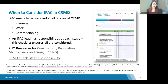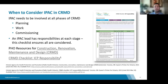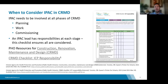Now I'll hand it over to my colleague Darius, who will go through the IPAC approaches to CRMD. As Tanya mentioned, we'll look at the different phases of CRMD. This slide shows the various phases — planning, work, and commissioning — and also showcases a tool developed at Public Health Ontario that helps you go through the various stages and consider all the implications that construction activity may result in.